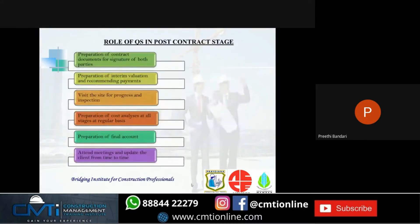The role of QS in the post-contract stage: preparation of contract documents for the signature of both parties, preparation of interim valuation and recommending payments, visiting the site for progress and inspection, preparation of cost analysis at all stages on a regular basis, preparation of final account, and attending meetings and updating the client from time to time.